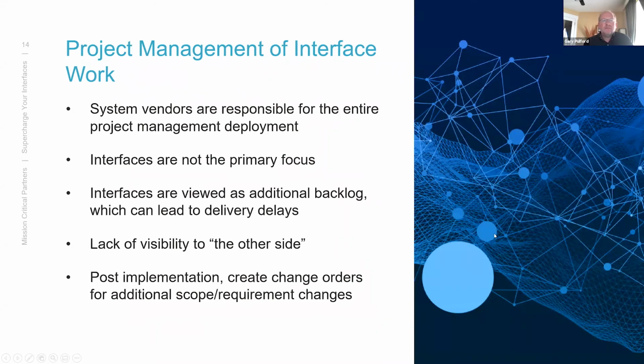All right. So project managing of interface work now. When you get the project, it's the system vendor's responsibility to manage the entire project deployment. That includes deploying the main solution, training, data migration, data conversion, interfaces, everything that's involved. Typically, interfaces are not the primary focus, because the main solution and the training for the users to be able to use it are the priority, which means interfaces are viewed as just additional development backlog.